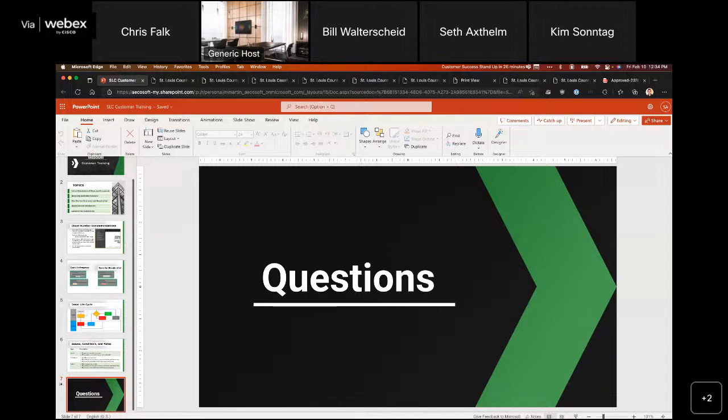Just a clarification on that addendum, that was a major lift for ePermit Hub, Seth, and we really appreciate you creating that addendum after the fact. But I think our customers need to be aware, and I'm sure they are, that that's intended for small addendums within the scope of work. It's always a good idea before going through that process to contact the appropriate plan review discipline that's involved to make sure that a separate permit's not required, so you're not doing the step twice.